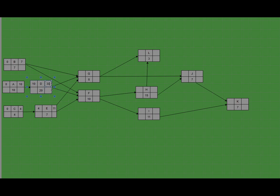For task F, it depends on three tasks: task E, task B, and task D. We find the maximum of these three because task F can only start when all three tasks are already completed. So the early start will be 30 and the early finish will be 40. For task G, it also depends on task B, task D, and task E, so we find the maximum of these three — task G can only start when all three are completed, giving an early start of 30 and early finish of 38.